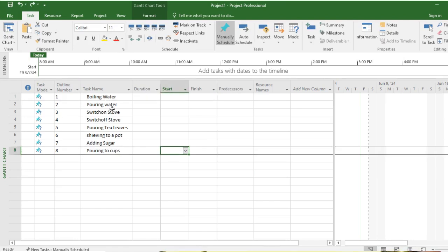So I very carefully recommend not to set any task in auto mode rather than manually scheduled before following these steps that I will show you here. What are they? You must add two things before creating an auto scheduled task list. One is the dependency, another is the duration. These things you must add. After that, you should auto schedule the tasks.